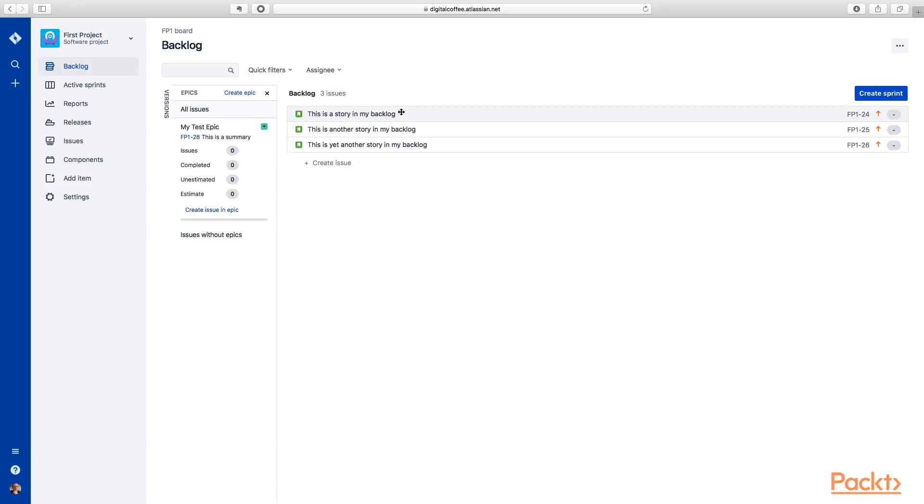Just a reminder, though, this epic is something, it's a story. It's a big story. But it's something that can be started and finished. It's important that this is not just a grouping. That's not the intent of this epic. An epic is a story. So if we want to group items in JIRA, that's a slightly different thing.